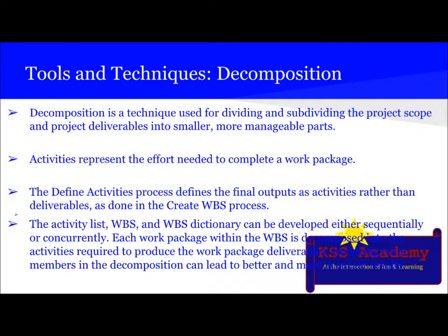So let's see one by one. What is decomposition? Decomposition is a technique used for dividing and subdividing the project scope and project deliverables into smaller and more manageable parts. Activities represent the effort needed to complete the work packages. The define activities process defines the final output as activities rather than deliverables as done in the create WBS process.